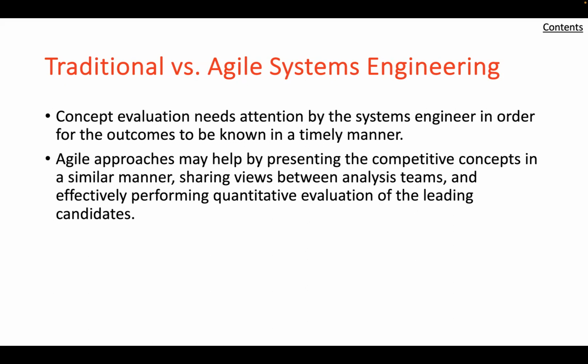However, this approach may be time-consuming in order to collect and analyze all the alternatives. If more promising alternatives emerge after the analysis phase has been done, then there may be wasted time and return to the analysis. An agile system engineering approach would perform similar actions with analysis of the alternatives, but perhaps look at a smaller segment of the system.